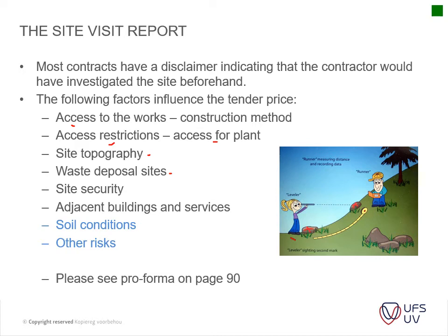And then you've got your site security. Do you have to spend a lot of money on your site security? Is it maybe located within the Joburg CBD? Is it maybe located somewhere where the crime rate isn't that high? So obviously that will influence your security tariff that you will have. Is it located on a mine? Is it located in a red zone or orange zone, or a green zone maybe on the mine, which will also influence how you price your P's and G's.